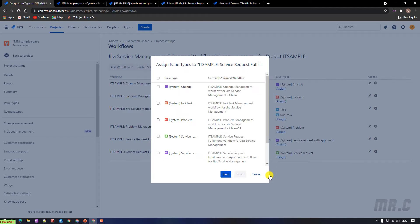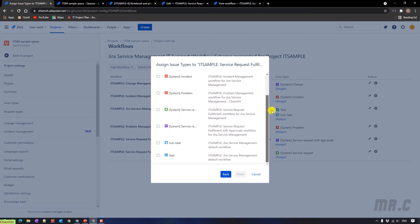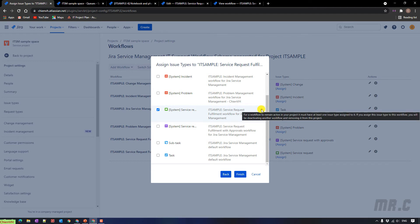In the next step, you have to select the issue type you want to change this workflow for. We have the service request here — you can see the name of the current workflow we are using for this issue type. Select this one. After you select it, it will display a warning icon. For a workflow to remain active in the project, it must have at least one issue type assigned to it.